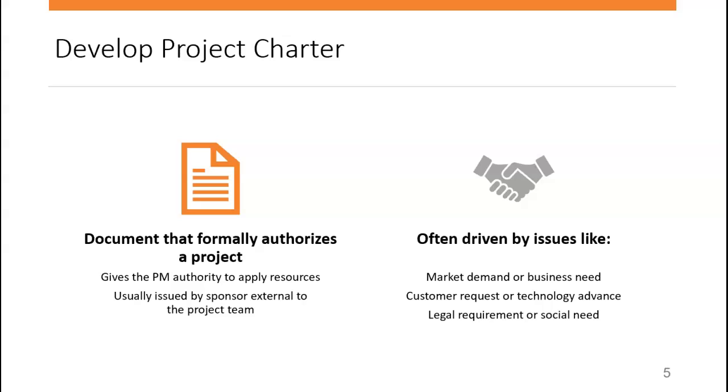So the charter, as I said, is always high level, but it's powerful because it is measurable. These are measurable objectives, right? So an example would be the Golden Gate Bridge. The business documents might be the mayor of San Francisco and the mayor of Sausalito who said, you know what, if we could increase commerce between our two sides of the bay, value would go up by $10 million a year in San Francisco and $4 million a year in Sausalito. Everybody wins. So those are like the business documents, super high level.